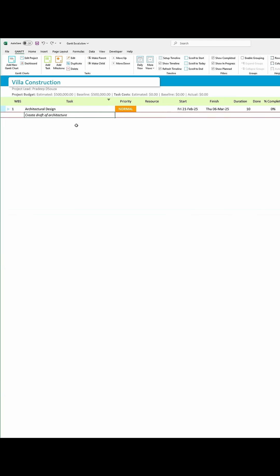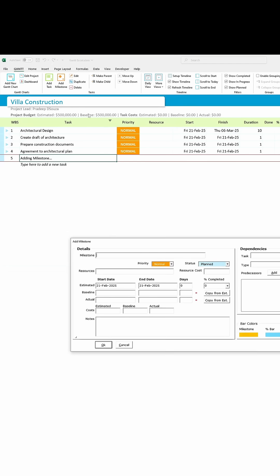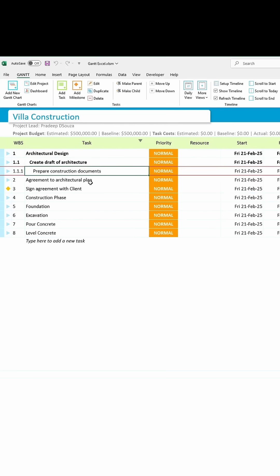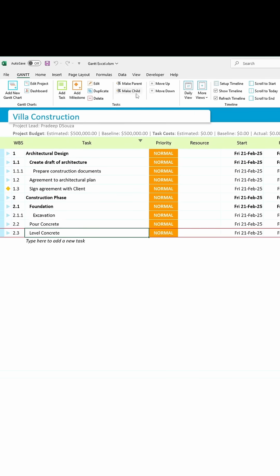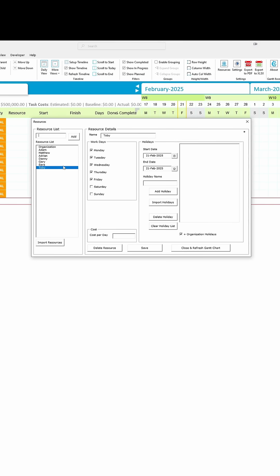List out all the tasks and add a milestone to track key events. Set up child tasks. Click the Resources button to add all the resources. Change the workday and add holidays.